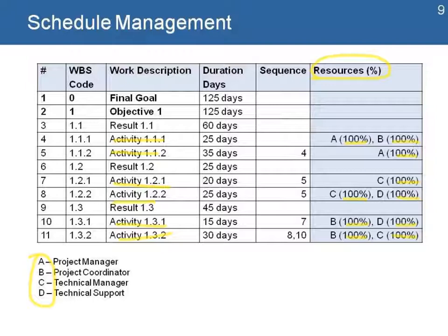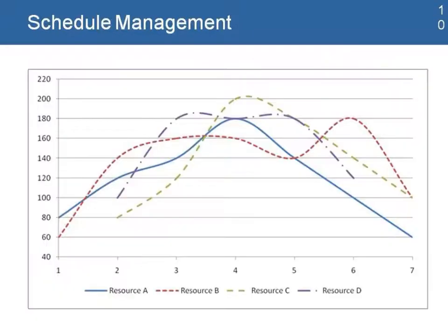So what usually happens is that when I use a tool that could be Microsoft Project or Microsoft Excel, and we plot those numbers, we end up with this type of graph. What these graphs are telling me is that one resource is being used up and then down, which follows the normal distribution of work in a project.